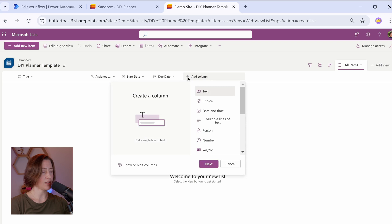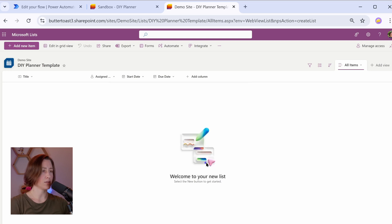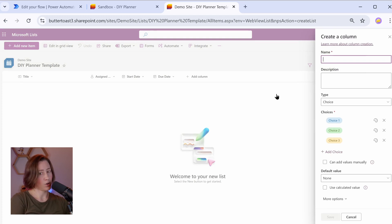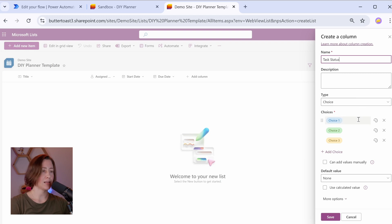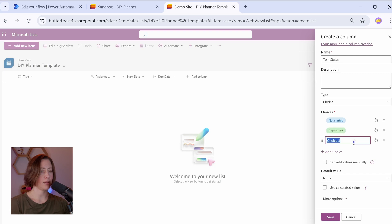Same thing for due date. Next is our status column. I'm intentionally making this a choice column instead of a yes-no column because I want some indicator that something is in progress, right, other than a percentage complete because you want to know when somebody's started on something before they've made any progress on it, or at least I do. I'm going to call this task status, and for our choices, we'll do not started in progress and complete.